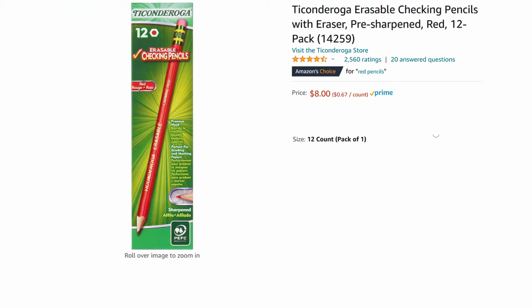As you count things like devices or light fixtures, you need to mark them off. You can use a highlighter for this, but I like to use a red colored pencil so I don't confuse them with notes and details I've highlighted. I also use a red pencil to check off every note that was highlighted in the review process as I work my way through the takeoff so that I know I addressed them.